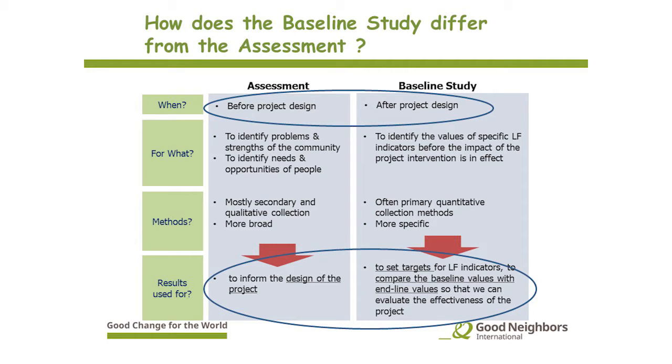So the terms baseline study and assessment are often confused and used interchangeably. But there are actually two distinct activities to be carried out at different times in the project cycle and for different purposes. In session 2, we talked a lot about the assessment, and right now we're discussing the baseline study. Hopefully you remember that the assessment takes place before the project has been designed. So we're using the assessment to guide our project design. And then the baseline study takes place now, after project design.